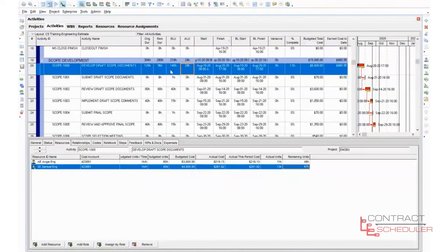Okay, so if we were to sort of summarize, when we're performing an estimate and to track earned value, we need to differentiate between our budgeted and duration hours, because the financials draw from your budgeted hours and actual costs, the actual units, which translate into costs. So that's also why it's very important that we have our baseline set, because it's comparing our actual schedule here, our current situation, to what we had projected. Okay, and that's in another tutorial talking about earned value.